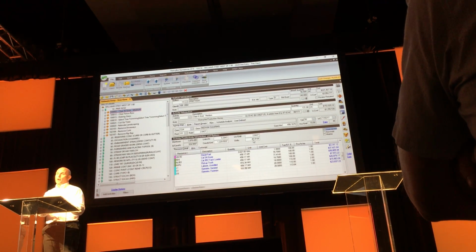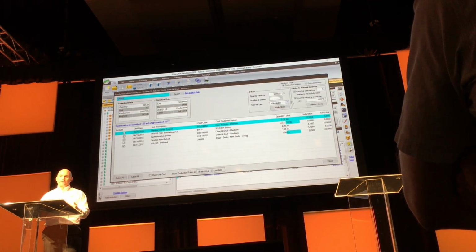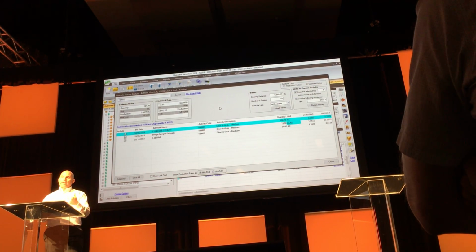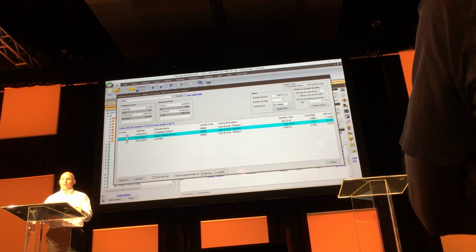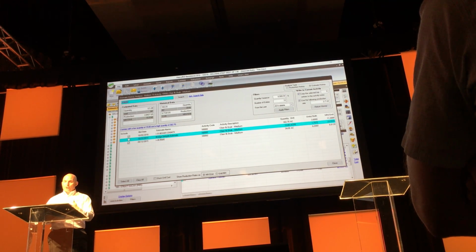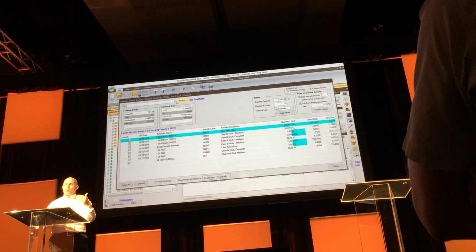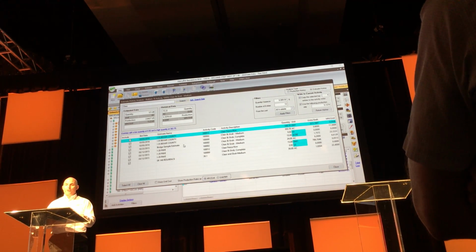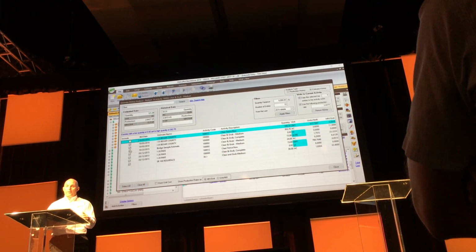Now I can also go to that same screen as an estimator, and I can do the same searches, not on production history, but on estimate history. So what it's doing here is it's using my historical estimates that I've put together and the bid production rates that I've done. So I can, again, do keyword searches here. So if I search by the word clear, it's going to show that regardless of what activity code I actually used. I can check or uncheck any of the things that I want to have as part of the comparison.